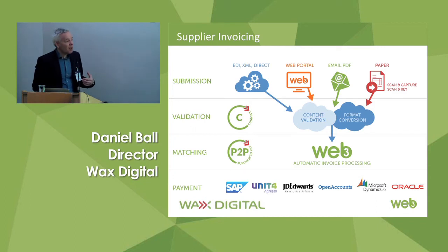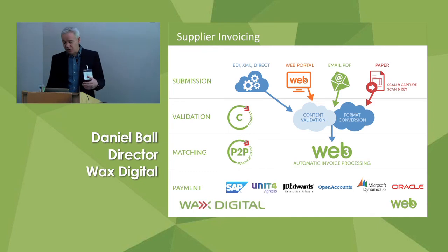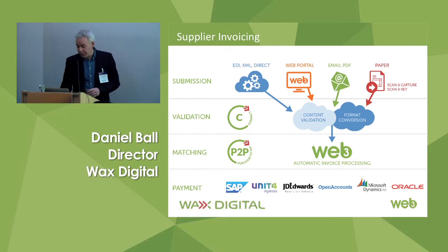Take your time. Migrate suppliers in tranches to the supplier portal so that you can reduce that cost of processing and engagement. Invoicing on day one through email processing is much, much more efficient and cost effective than manual paper or OCR processing. And then again, when you move them over to the portal, you're driving the cost down to small from the outset and through to none at all subsequently.